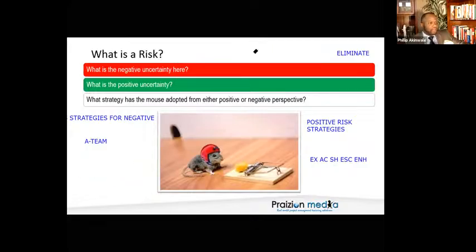Okay. All right, let me give you another one. Phil is a project manager on a project. He's working with certain chemicals. He discovers a chemical that could be the answer to a long-standing industry problem. He decides to give some of the positive risk responsibility to a partner. What strategy is that? You got it. Very good. It's share. Whether you give 100% or 10% or 20%, as long as you're bringing in that third party, you're talking about sharing.